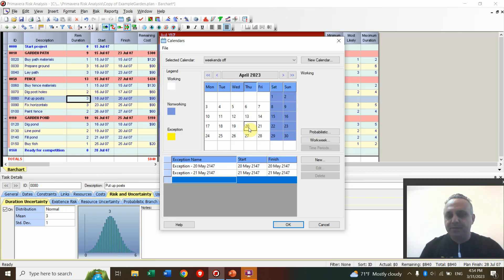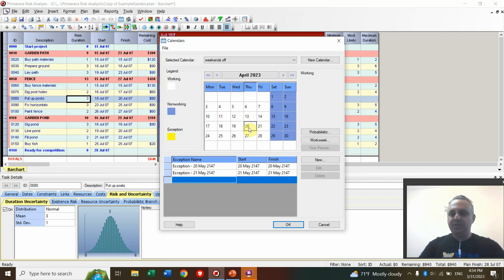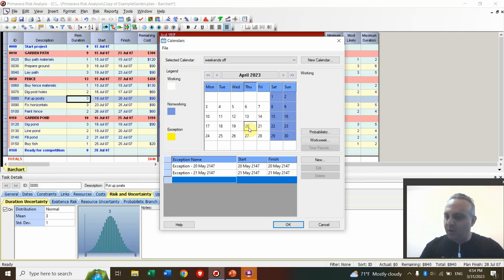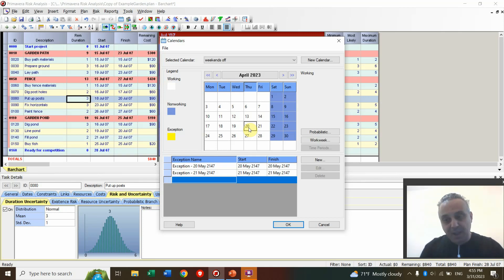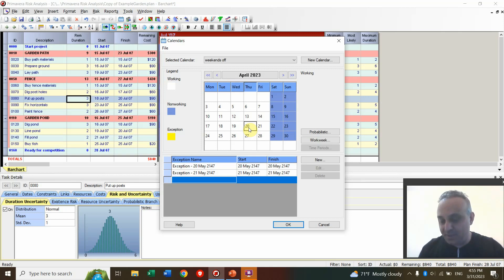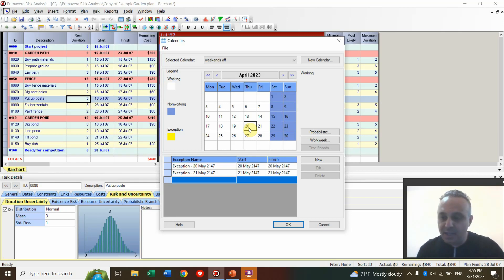The probabilistic calendar option in risk management lets you handle that uncertainty. Similarly, you can model probabilistic risk on the cost of your resources. For example, if you define a resource at 20 US dollars per hour, all assignments are calculated at that rate — but due to inflation or salary increases, that resource may request 25 US dollars per hour, or there is a chance to negotiate it down. This is another type of risk you can model on the cost of your resources, which will affect the project's budget, and you will see the same results reflected in your project cost output.